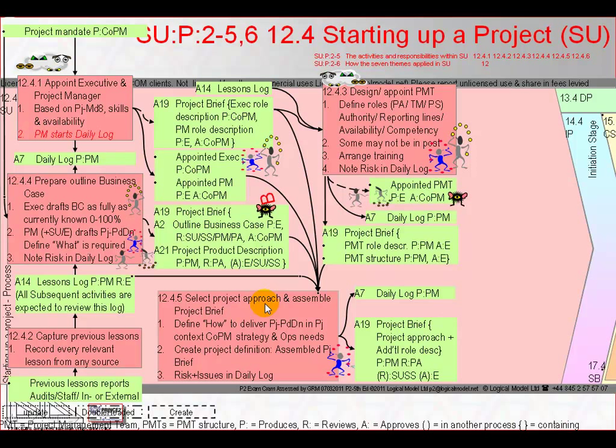A19.5 as being one of either taking a supplier's standard off-the-shelf solution or creating something bespoke, which is an English word meaning custom-made. Approach includes deciding whether to acquire, create, or implement using contractors or in-house staff who are already on the payroll. And approach also covers whether to design from new or adapt and modify something existing. This all depends on customer and supplier preference and standards, on development life cycles chosen, and through life operational and maintenance needs, plus consideration of training needs and health, safety, security and environmental needs.